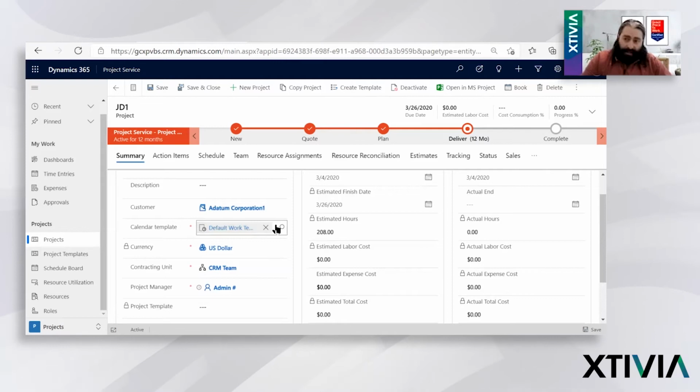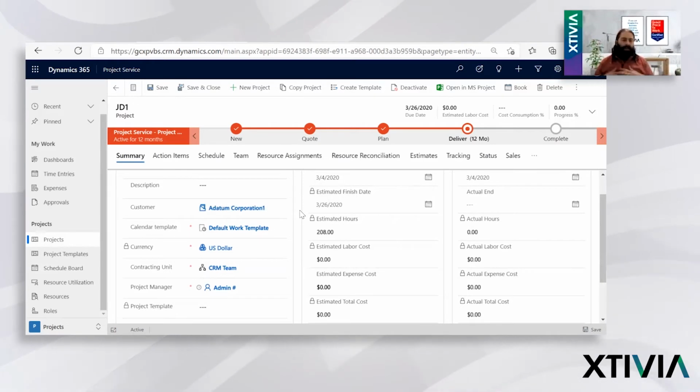You can also set up templates. So what that means is that, as an organization, anytime you create a new project, maybe those projects are very similar. They have the same tasks. They have the same resources allotted to them, whatever it might be. You can set up templates so that every time you go create a new project, you don't have to go manually put all that information in. You may have to change something, sure, but it saves you time, and I don't have to go in and create every single task and assign every single resource and fill out all this information. Because if you're using a template, it can pre-populate all of that information right in there for you.